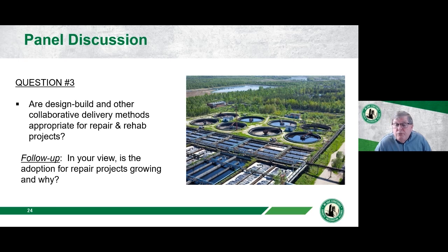They had their engineer of record, T.Y. Lin, and then we came on board working for PCL as their construction engineer to take their desired means and methods and communicate those effectively to T.Y. Lin so that they would then embrace and design the details that the contractor wanted to build.